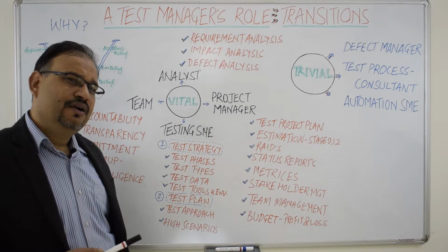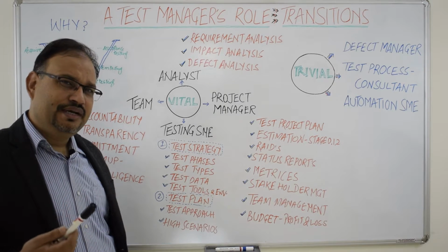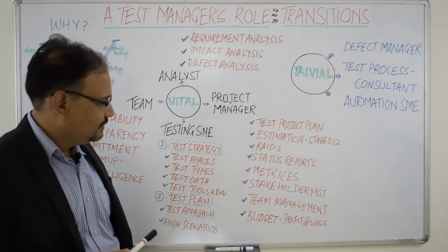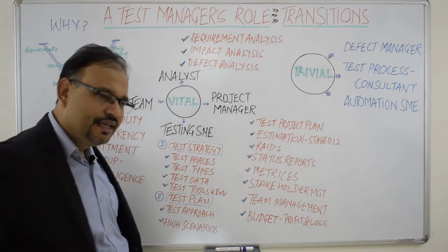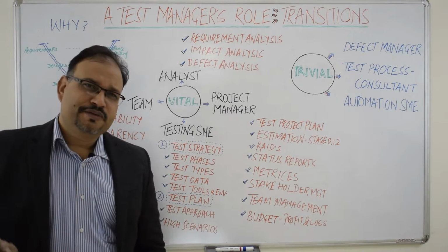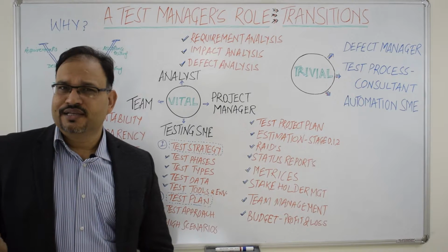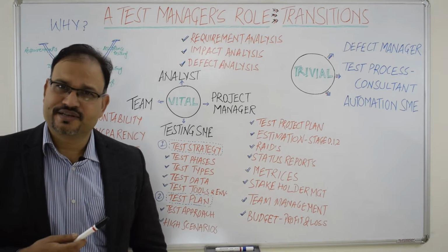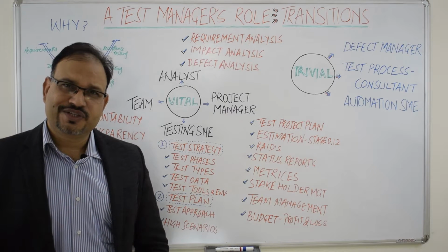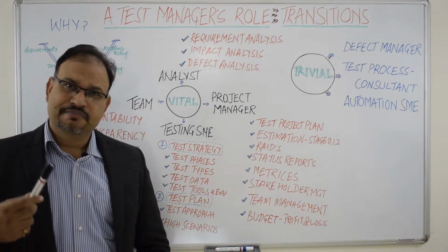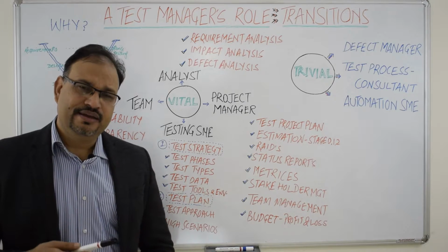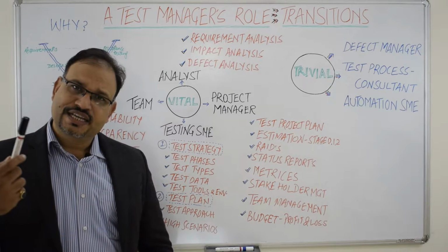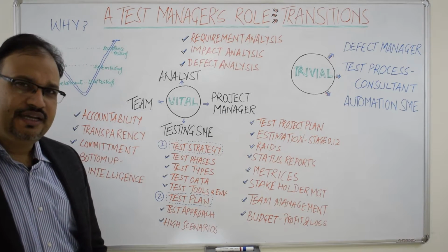These reports are normally very lengthy because they do contain a lot of details about the defects. Metrics. Apart from the normal project management metrics like schedule variance and cost variance, he comes up with other testing-specific metrics also, like defect rejection ratio, defect removal efficiency, percentage defect leakage to the UAT, defect density, testing effectiveness, cost of quality, and so on.